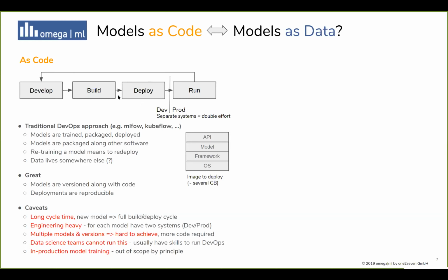Also, of course, this takes quite a long time, even if you have automated it, because it involves a particular series of steps. In many companies, you also need to raise a change request if you want to go from development to test to production, and that takes time. And so there is a lot of organizational overhead attached to this model as well.